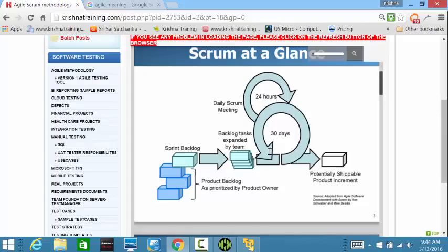So 12 people were required to develop this application for 9 months. When we defined this project plan, we all discussed it. We had to decide what risks could apply, like if you lose some of the resources in the middle of the project, would there be any impact. They considered everything. The actual estimate came to around 7 months, and they added a buffer of 2 months to consider all the identified risks. There might be issues, there will be rework effort, we might lose resources and have to get more, and there will be onboarding time for new resources. They added every other aspect of the project methodology and said it will take 9 months.